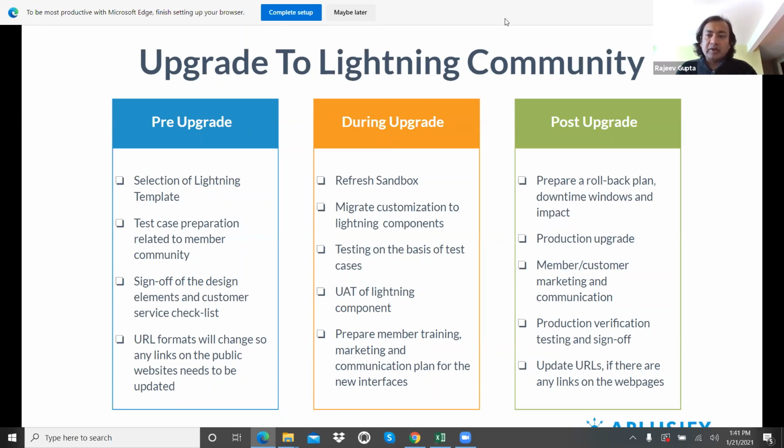They have to upgrade from 2018 R1 to the next version, make sure data is transformed properly and tested to some extent. Then their scripts need to be run to transform that data to the next version of data schema, so that they combine the data changes from one release to the latest release. There could be two intermediate steps, so that reduces the cost of testing. If you are jumping multiple versions at a time, you can save some time, but it has to be done. You won't see the difference, the technical team will.